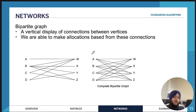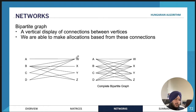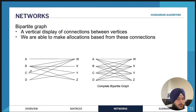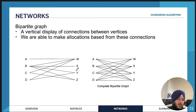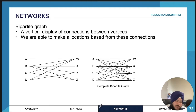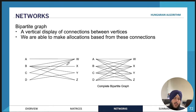The bipartite graph indicates, for example, that person A can perform task W only, whereas person B can perform tasks W, X, Y, and Z — all the tasks. Person C can only perform tasks W and Z, whereas person D can only perform tasks W and Y. If person A can only do task W, then they must be allocated to task W, because otherwise we have one person doing nothing, which is a waste.